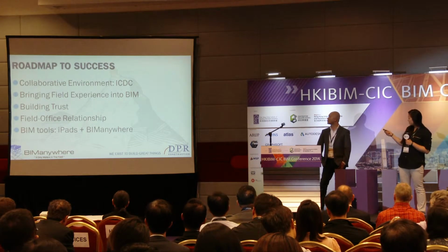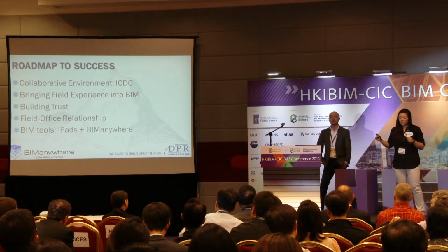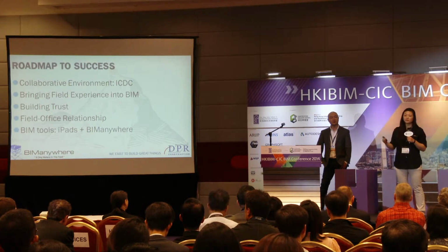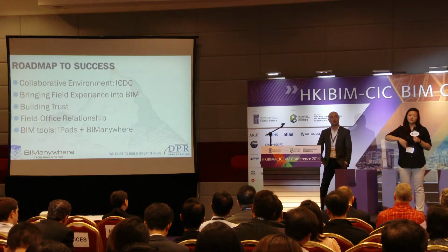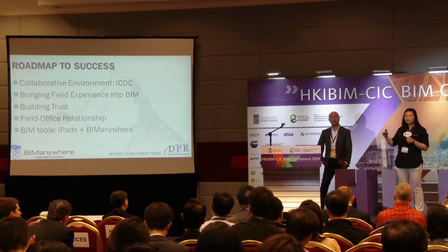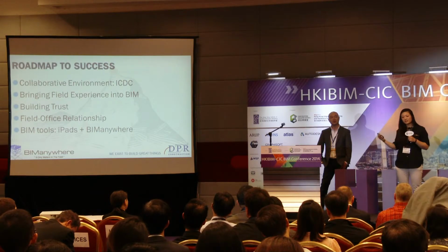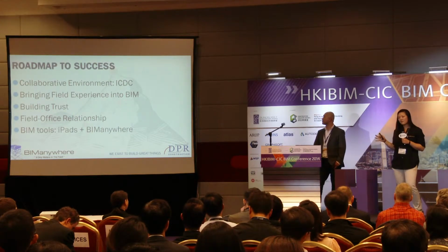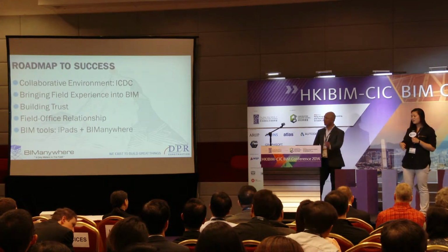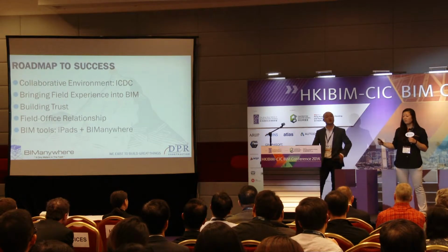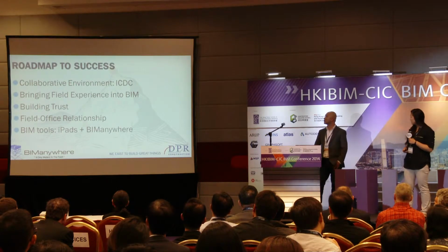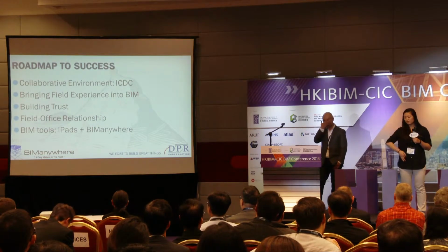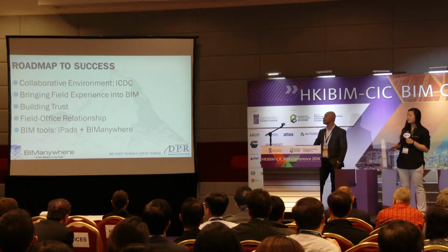That also brings us to the field office relationship. Because we're using the model to do construction, that bridges a relationship between the field and the office. You're bringing field experience into the office, so your field guys who are doing the installation can trust that they're getting information from someone who knows what they're talking about. This is, I think, a little bit different from how things are done here, but in America the subcontractors are the ones doing all of the modeling. So BIM tools helped us greatly: the use of iPads for viewing construction documents, and now with BIM Anywhere, viewing the 3D model on the iPad.